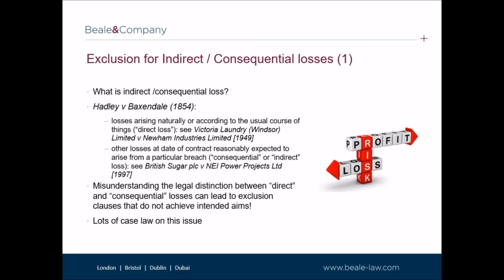When a contractual clause excludes or limits liability for consequential loss or damage, it only excludes loss under the second limb of Hadley and Baxendale. The scope of such an exclusion may therefore be far narrower than one actually realises. In particular, the law often regards loss of profit as a direct loss and not indirect and consequential loss. And there are a few cases that demonstrate this.